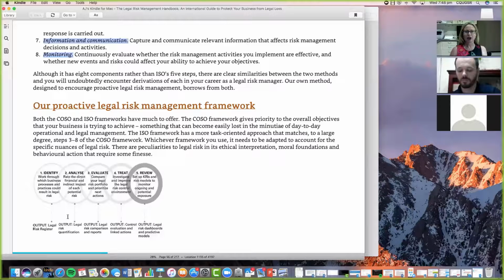Matrix. And what they do here is they grab out two extremes. They say, what if this risk crystallised, what would the typical kinds of losses be? Put a hard number on it, okay? So we've lost that assessment about whether or not the risk might occur. There's no assessment about the likelihood of this thing crystallising. They proceed from the assumption that the risk will crystallise, okay?